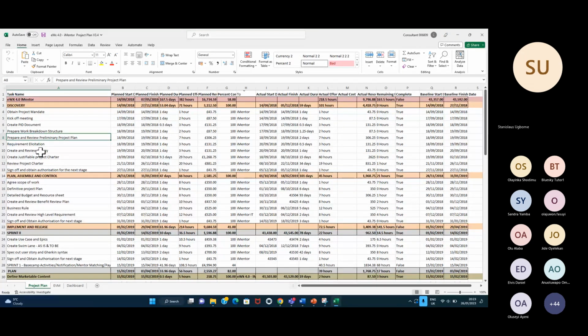You can start asking questions and looking at, okay, what are the things that we can do to be able to elicit requirement from different stakeholder, you gather your data, you elicit requirement from your project sponsor, from the users, from everyone. Then you can be doing everything together at the same time and you will create your survey at the same time. Because the people that are going to respond to your survey are not your project sponsor. So you can actually create your survey at the same time you are doing your elicitation with your project sponsor. So that is the start to start, and there's no dependency there. But whereby you have to obtain your project mandate first, you can't start your kickoff meeting without obtaining your project mandate.